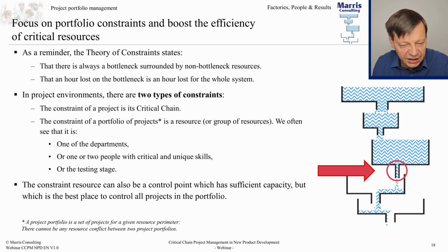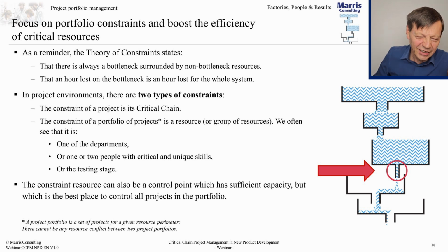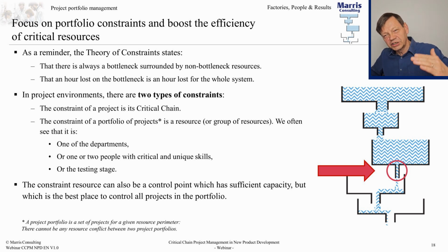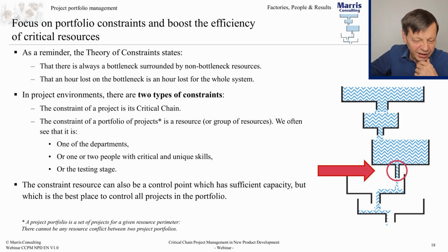Watch out, as you can see from this diagram, there's a lot of work in progress everywhere before the bottleneck, right? So there's going to be big queues all over the place. Find the place where there's a breakthrough, where just afterwards it clears up. That's the solution.